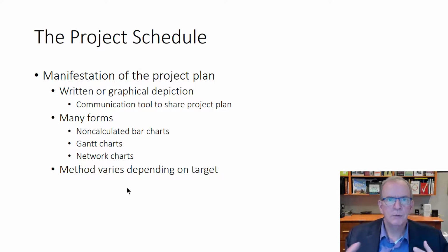So you might work collaboratively with a BIM coordinator in developing the schedule, a senior site super, a project manager, and a BIM coordinator that might be taking the architectural Revit model and building a schedule in Navisworks Manage, to be able to collaborate and see the components, how they go together, and have those as talking points and discussion points, and seek more information in detail where something seems overly complex.